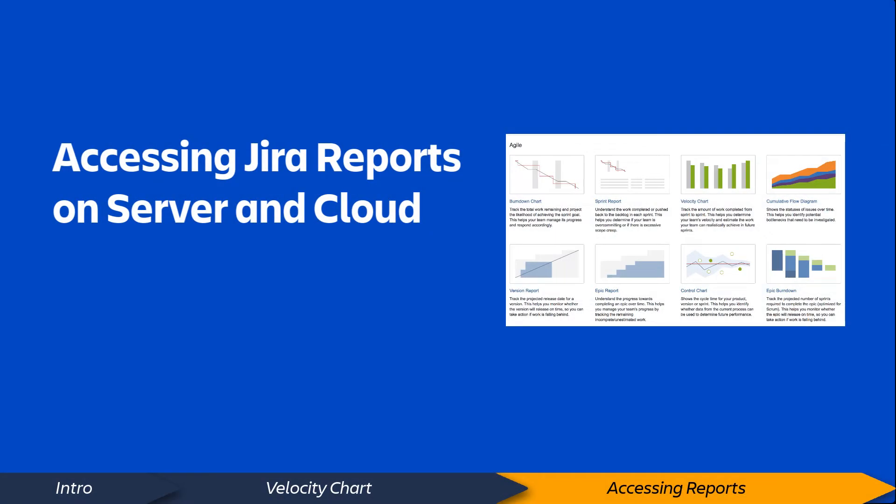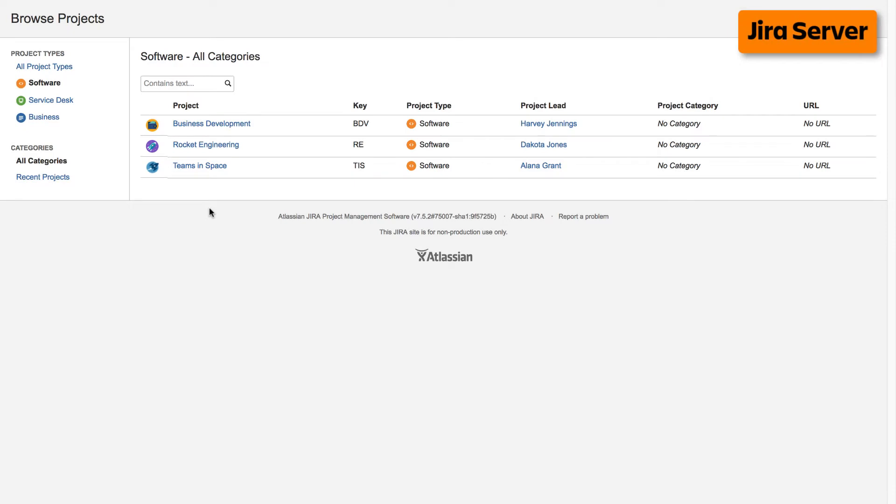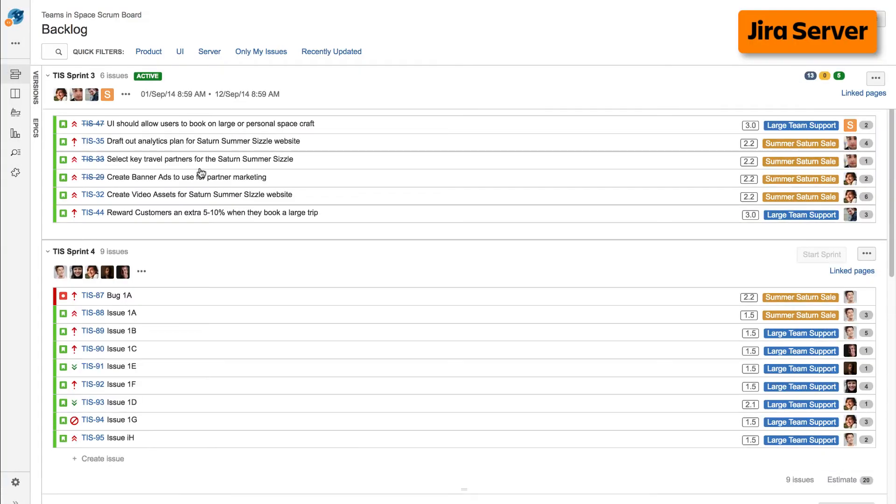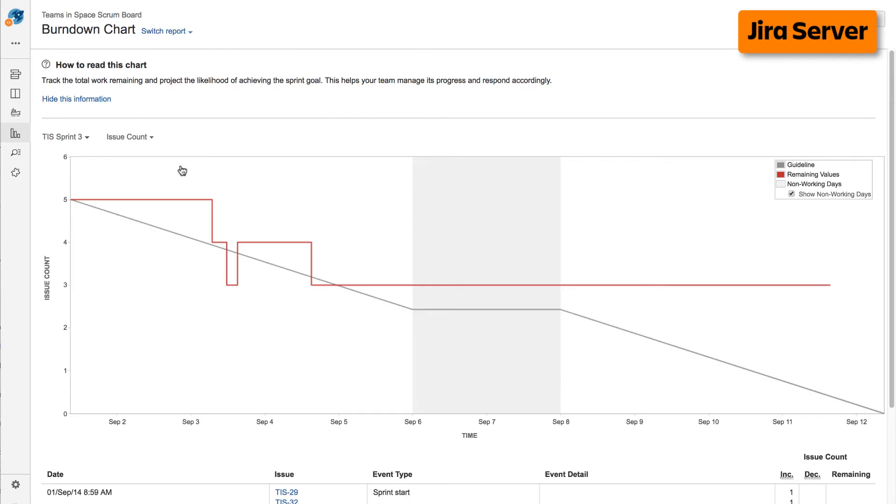Now, let's take a quick look at how to access reports on both cloud and server versions of Jira. To access reports on the server version of Jira, navigate to your desired project, select reports from the left taskbar, then select the desired report from the Agile Reports display.